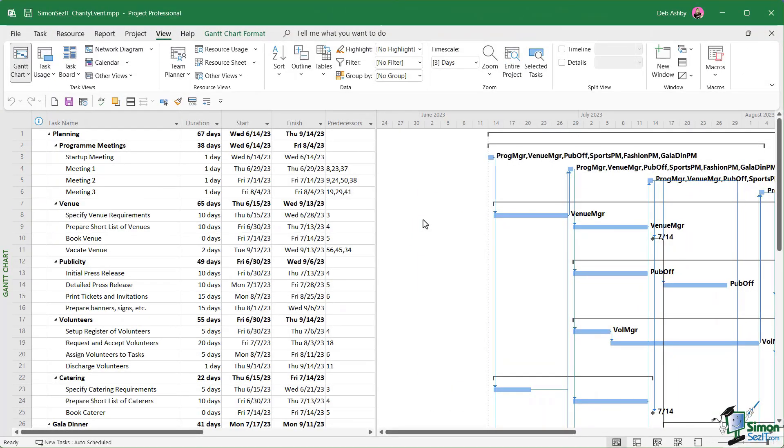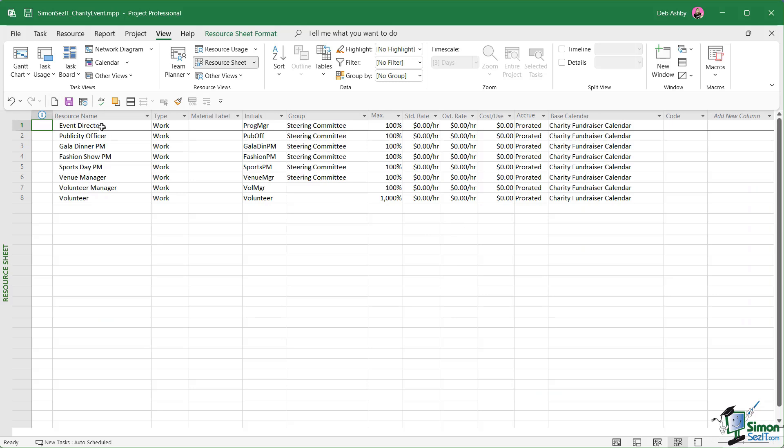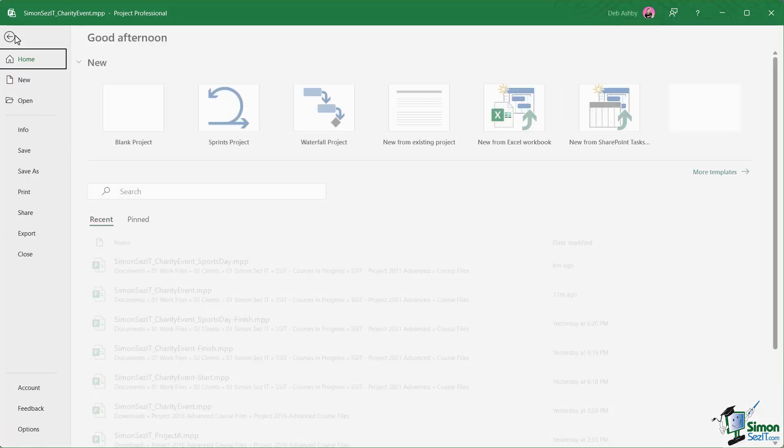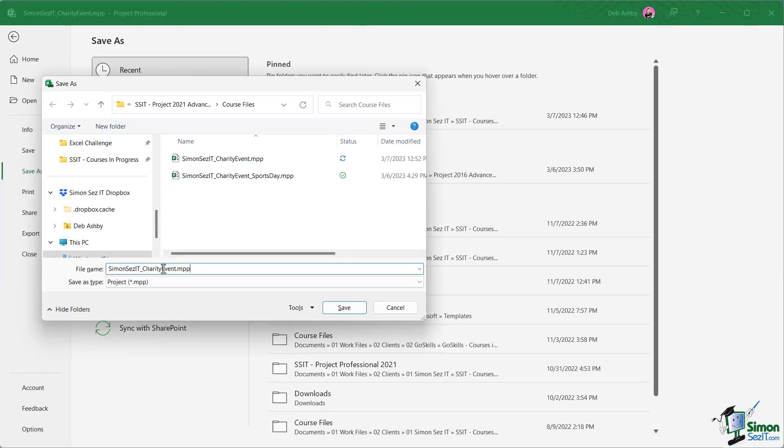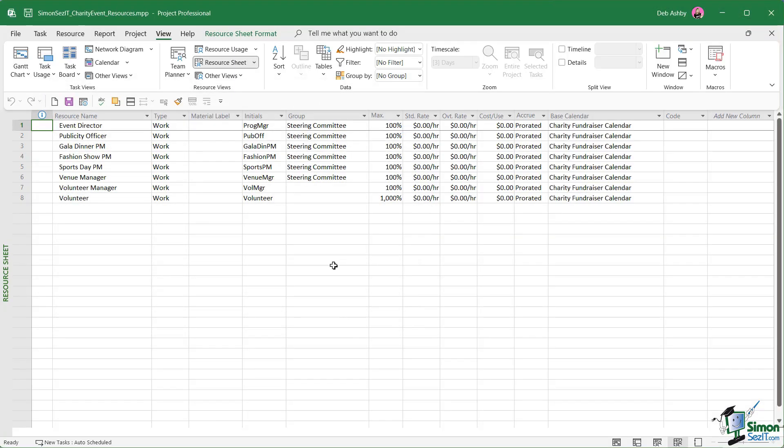I've closed down the smaller sports day file, so we're just back at our original charity event file. If we switch across to the resource sheet, we can see that we have a pretty good base for our resource pool because we have all of our resources listed in here. What we're basically going to do is make a copy of this file by saving it as a different name, and then we're simply going to remove all of the tasks. So let's jump up to File and down to Save As. I'm going to save mine into the course files folder and I'm just going to call this charity event underscore resources dot MPP. Let's click on save.